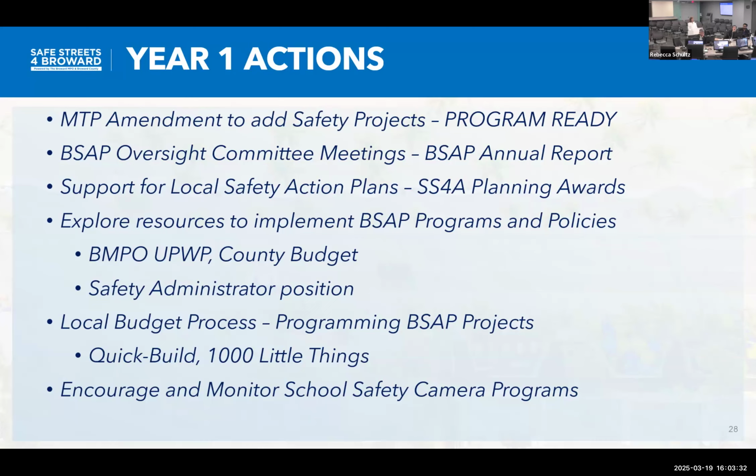As we look at projects to put into our MTP, we're typically thinking about projects that have at least a $3 million price tag. And so as we come up with cost estimates, we'll want to look to see some of the rail improvements. Let's say it might be $1.5 million, or 1.5. So if we group them together, we'll get a $3 million project. So we might look at how we group some of the projects in that regard. I'm trying to think, because we had quite a long conversation about this yesterday, but there's a variety of ways that we can approach this.